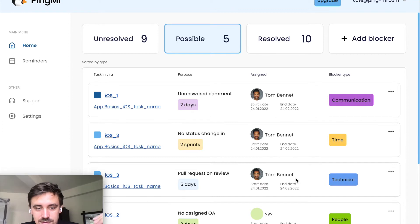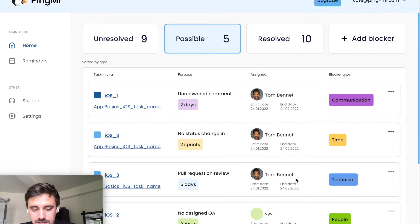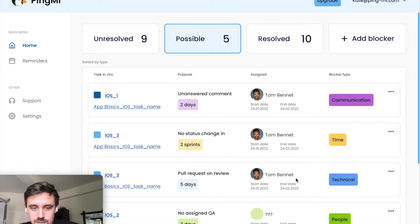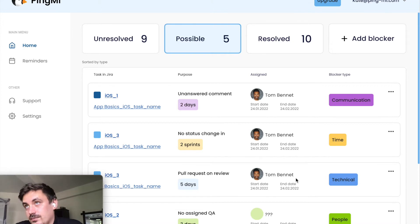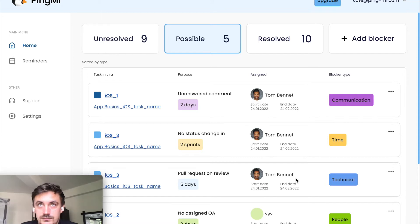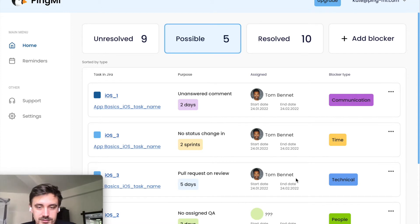Second type, it's if a ticket doesn't change status for about two sprints or two weeks, it can be configured. If, for example, someone just forgot about the ticket and it's wasted, you can see it here.